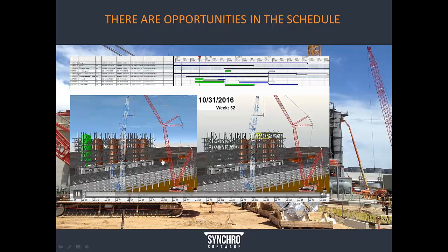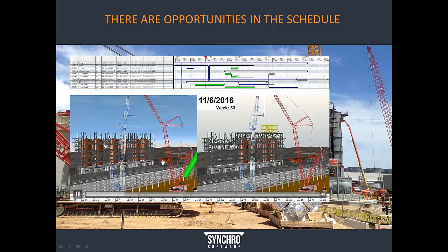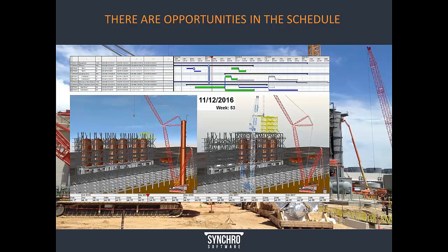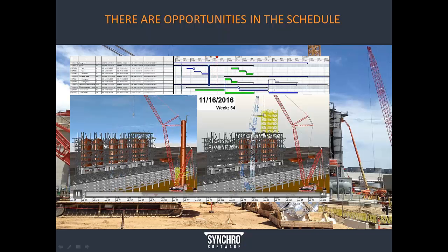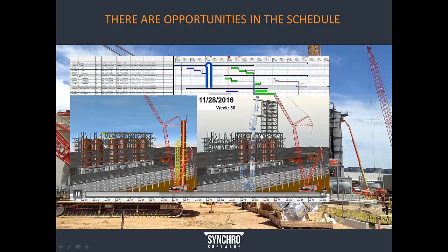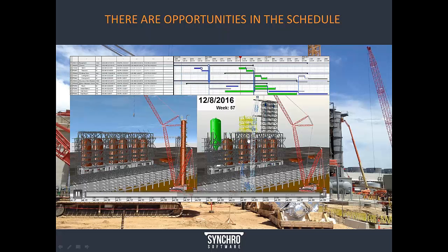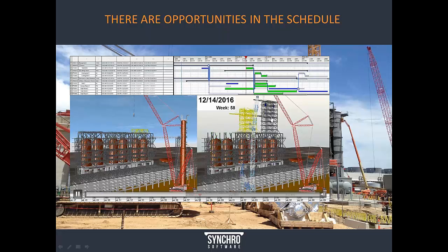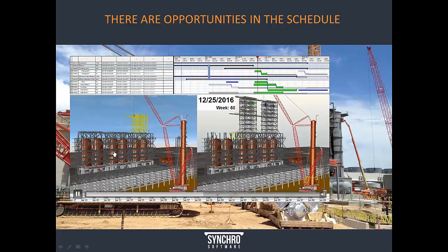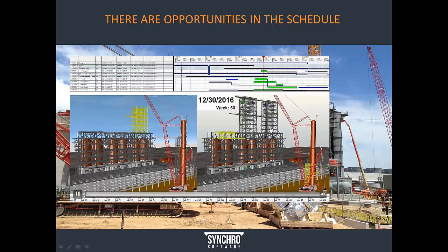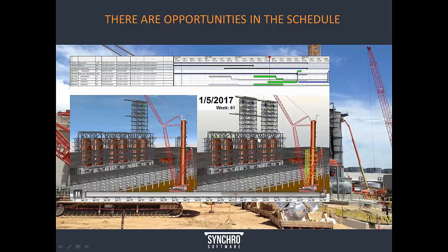They can also, because of the visualization and the ability to pull everybody together, include the structural engineers in this discussion to make sure that what's being suggested as an alternative plan is actually structurally feasible and sound and safe. So what ends up happening is the tanks are delayed late, but the structure is actually completed earlier, and what originally looked like a given delay in the schedule actually turns out to be completed earlier because of the ability and the opportunities that are presented in the schedule when used in the 4D environment.